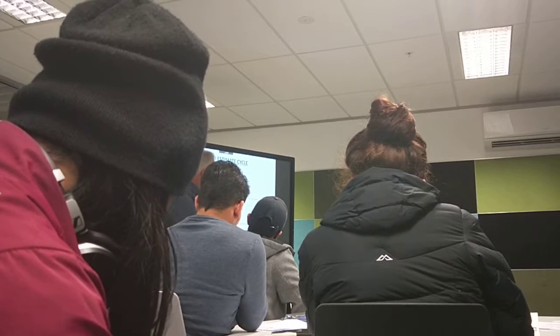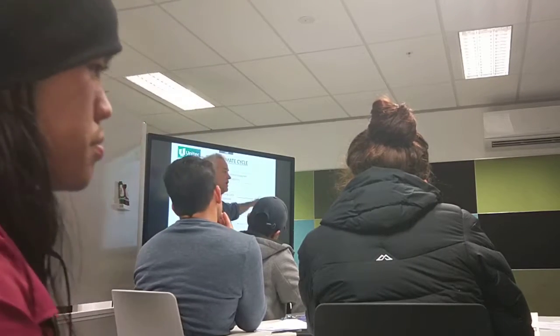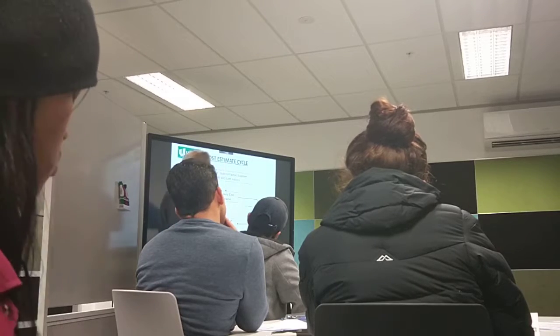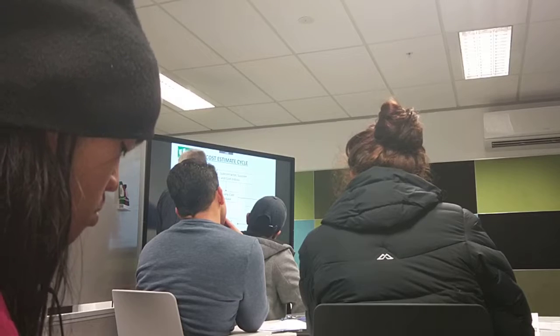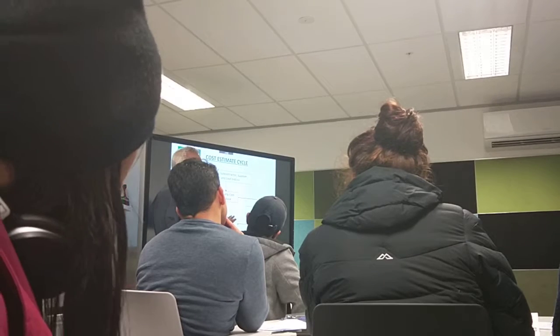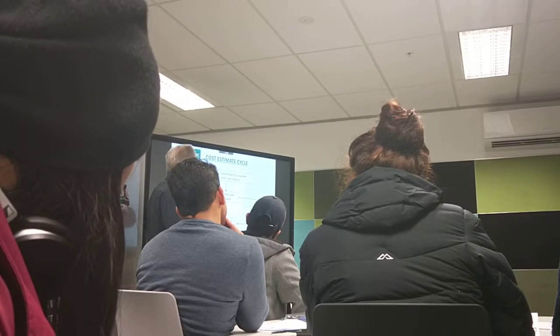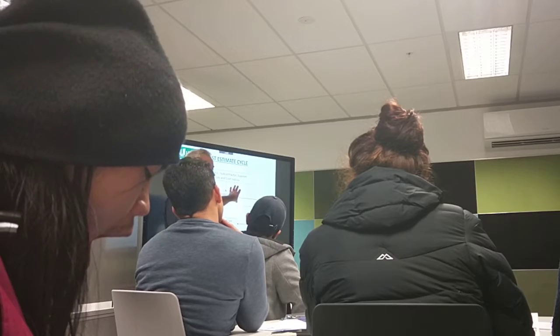So the way it works is you work out a tender price based on previous projects, then you run the project, hopefully getting it in within your estimate. You collect data about what it actually costs. You put that data into your company cost database.